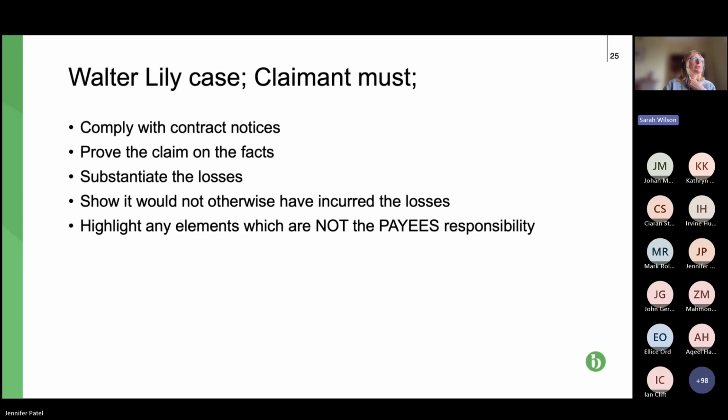It was pretty easy on the claimant contractor as regards issuing notices, and took a fairly common sense perspective on it, and basically said, assuming the contract administrator knew that there were delays or that there was going to be loss and expense, the court wasn't too bothered that a formal notice might not have been submitted. If there were minutes of meetings warning about it, that was sufficient. So that's why I say it's a fairly common sense approach.